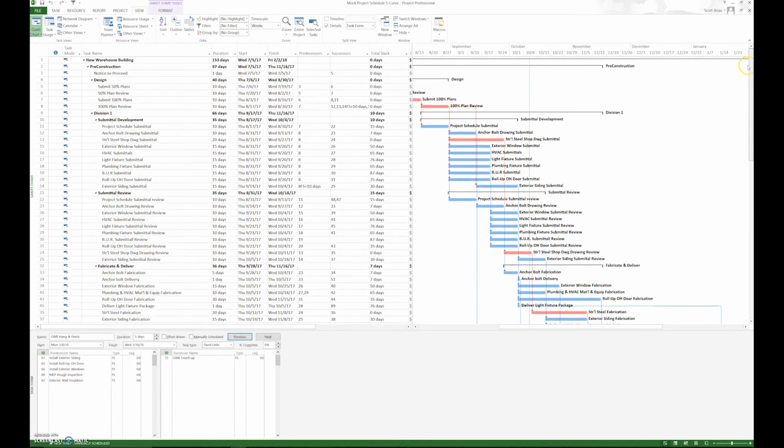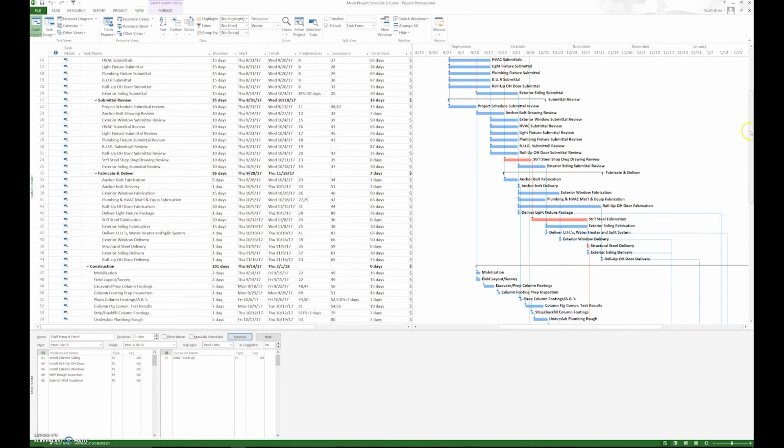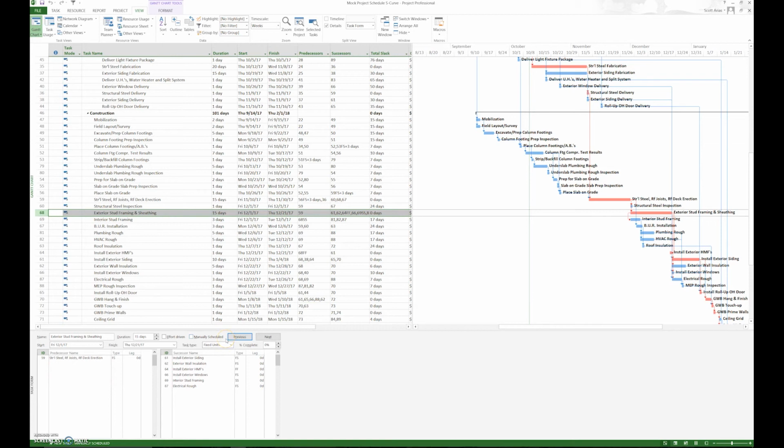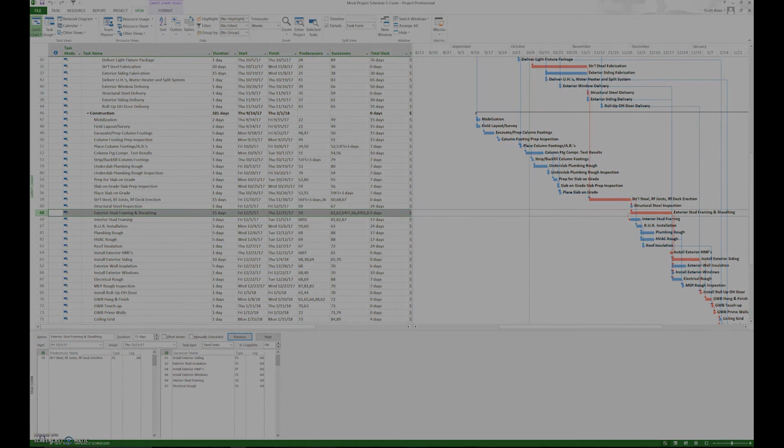You just need to be conscious. When you put together all the relationships, you need to be conscious of how they're actually linked. And by going through and making a tangible effort to see if any redundancies exist, we're able to remove those redundancies, and in the process create a better schedule product and spend less time on it during the execution phase. So removing redundancies is just removing a relationship, whether a predecessor or successor, that is unnecessary because the existing logic already has it fitting within the schedule. So that pretty much covers step number 13.